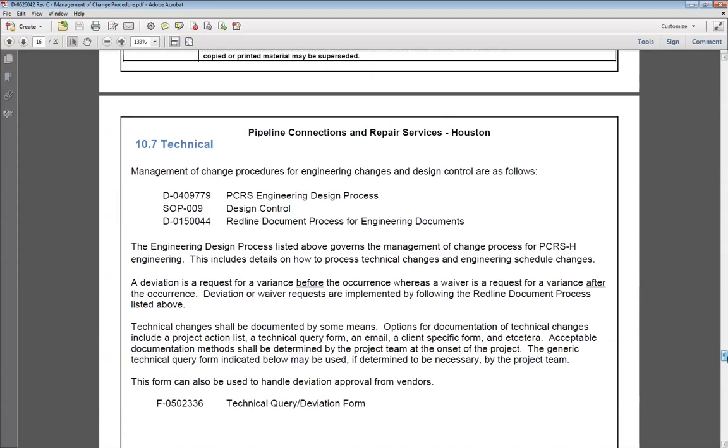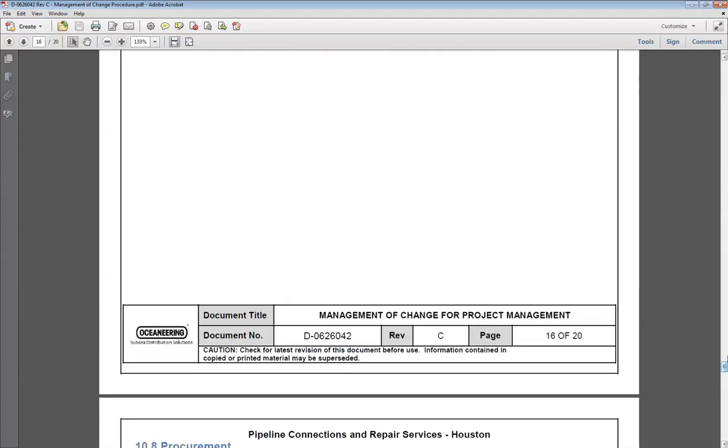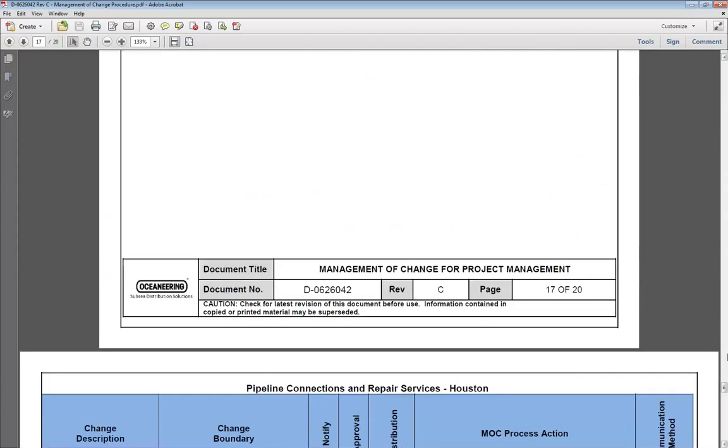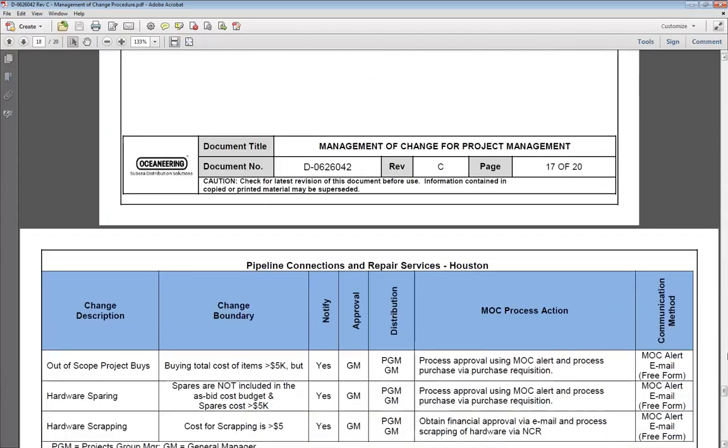I think I know what you're asking, but we don't go and rebaseline just because internally we were deficient. And I'm not even talking about rebaseline, but say you have something in the specification calling for a certain material, and you can't get the material, but you can suggest an alternative that the client will accept, but you've got to have some way to document that. So that's a deviation request. Okay. Those kinds of things, if it's a client approval, we'll send a deviation request to the client. And there's a formal number.